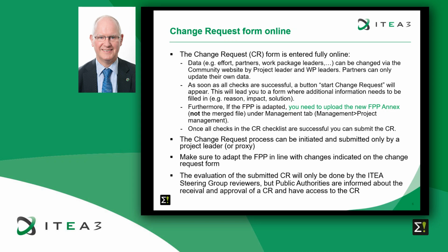Now let's have a look at how the change request will be handled. The change request form is entered fully online. So data, for instance, effort, partners, work package leaders, etc., can be changed via the community website by the project leader and the work package leaders.